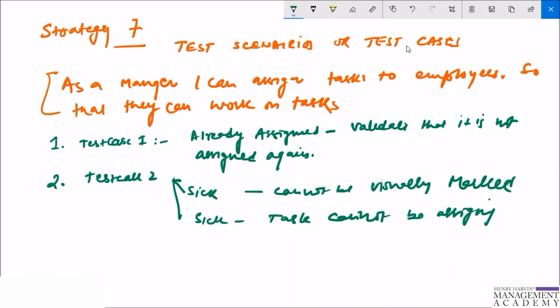But if a test scenario is not very common to begin with, or does not present a high enough risk, a product owner can decide to skip the functionality for the time being and focus on the test scenarios that deliver more value to the system. In other cases, a test scenario can be simplified to cover the most urgent issues. Either way, relevant test scenarios can be easily translated into backlog items and added to the sprint backlog, right?